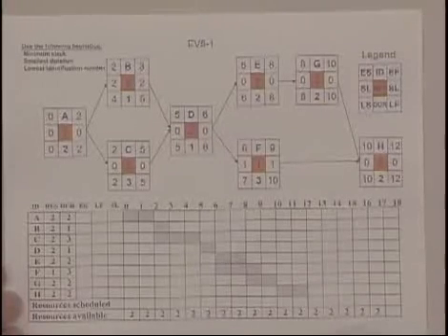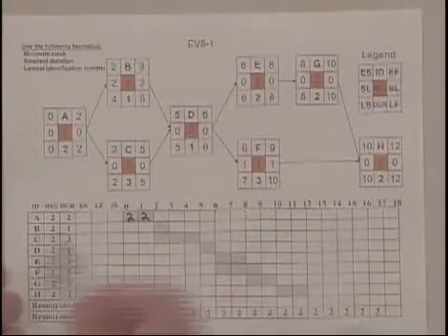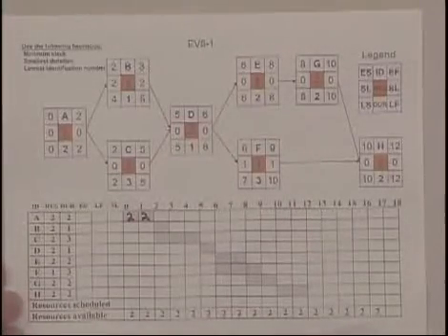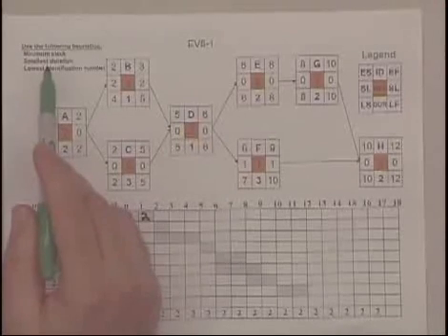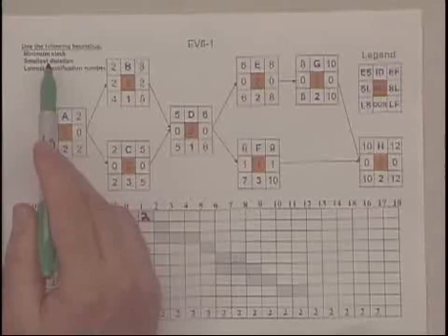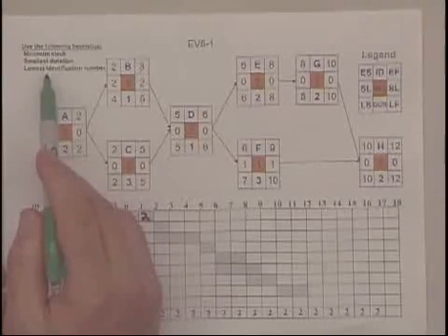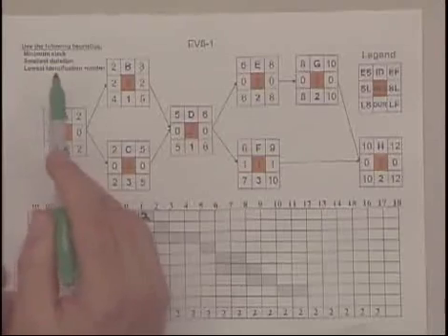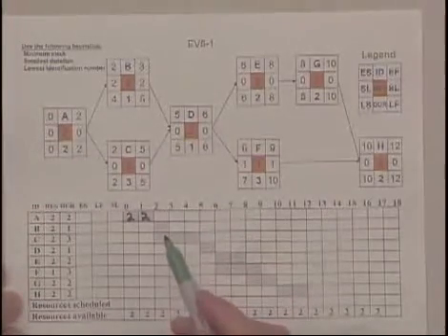Well, we look at activity A, and there's not a problem because it only requires 2 tractors. But when it comes time to starting B and C, each of them requires 2, so we have to make a choice. This is where the heuristics come into play. These are the rules that the computer uses to optimize the schedule. First, it chooses the activity with the least or minimum slack, and if they have the same amount of slack, then the smallest duration. And if both of those are true for the activities, then they choose the one with the lowest ID number. In this case, C has 0 slack and B has 2 weeks of slack.